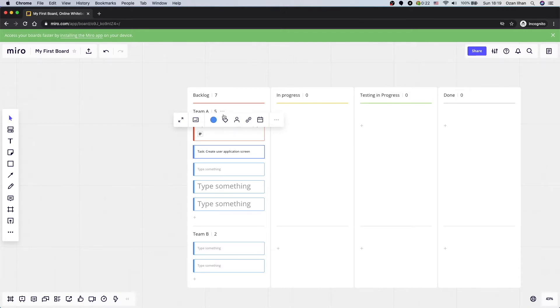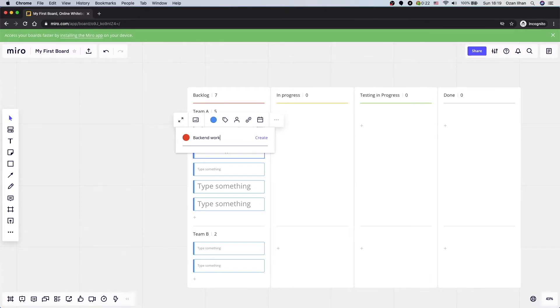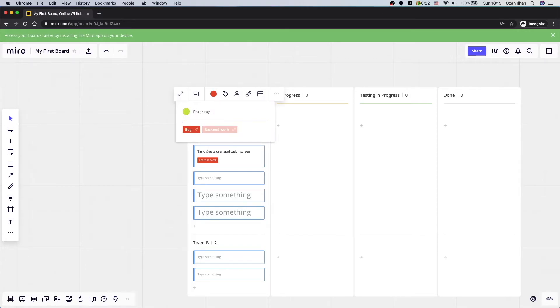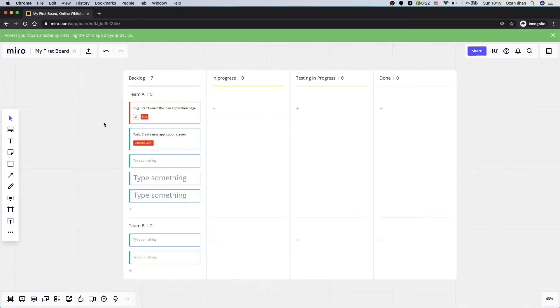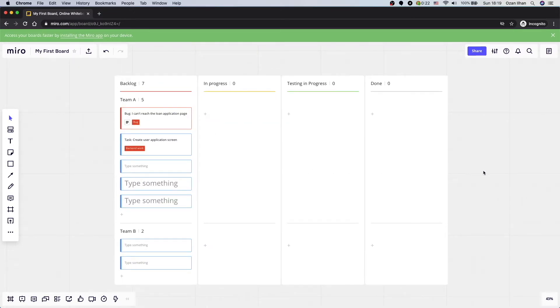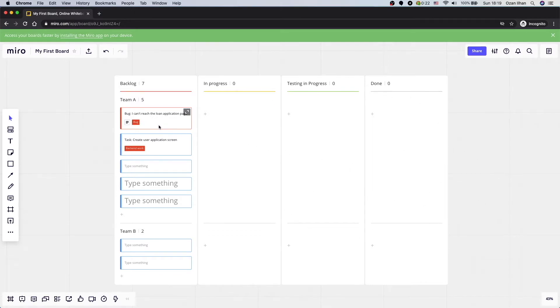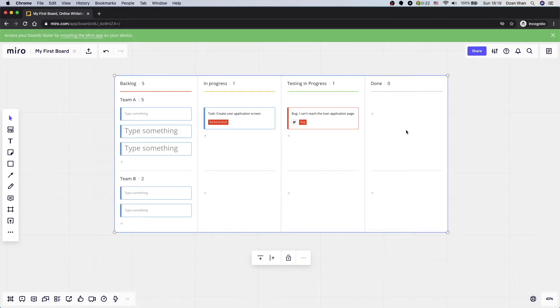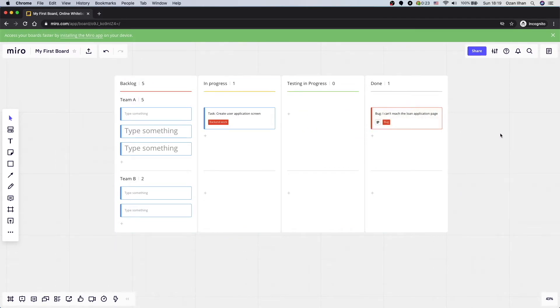Also on these cards, you can add labels. For example, let's say this will be back-end work. So I tag it as back-end work, which means one of our back-end engineers will work on it. So this is a bug. Basically, if you're a small team, you can easily handle your project lifecycle by using this template. Once you are working on it, it can go to in progress. You can just drag and drop it. When it's testing, you can put it in testing. And afterwards, the last step is done.